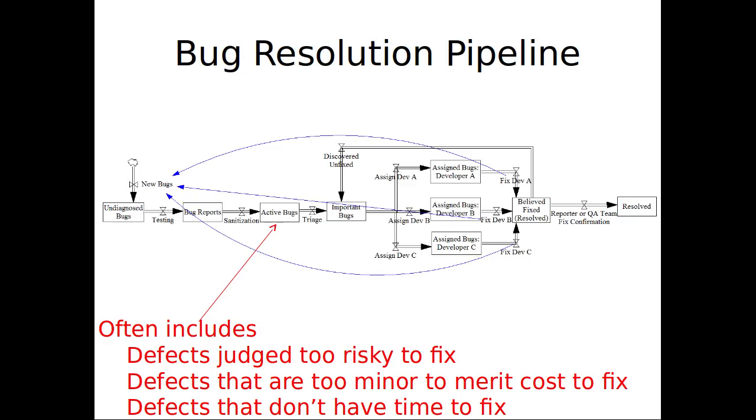Maybe it's little used, right? It's a feature that's used by very few people. It's only used in these very special cases, and we don't have any customers who need that right now or what have you. Yeah. It could be a bug related to some third-party library or software that you have limited control over, but rewriting your system to remove that library entirely might be unreasonable. Good. So it might have some external dependency that's just not realistic to get rid of, and again, you're willing to live with that.